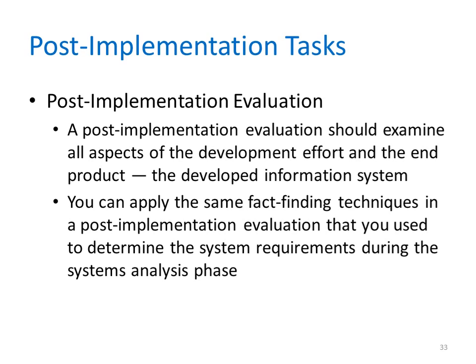Whenever possible, people who were not directly involved in developing the system should conduct the post-implementation evaluation. IT staff and users usually perform the evaluation, although some firms use an internal audit group or independent auditors to ensure the accuracy and completeness of the evaluation.